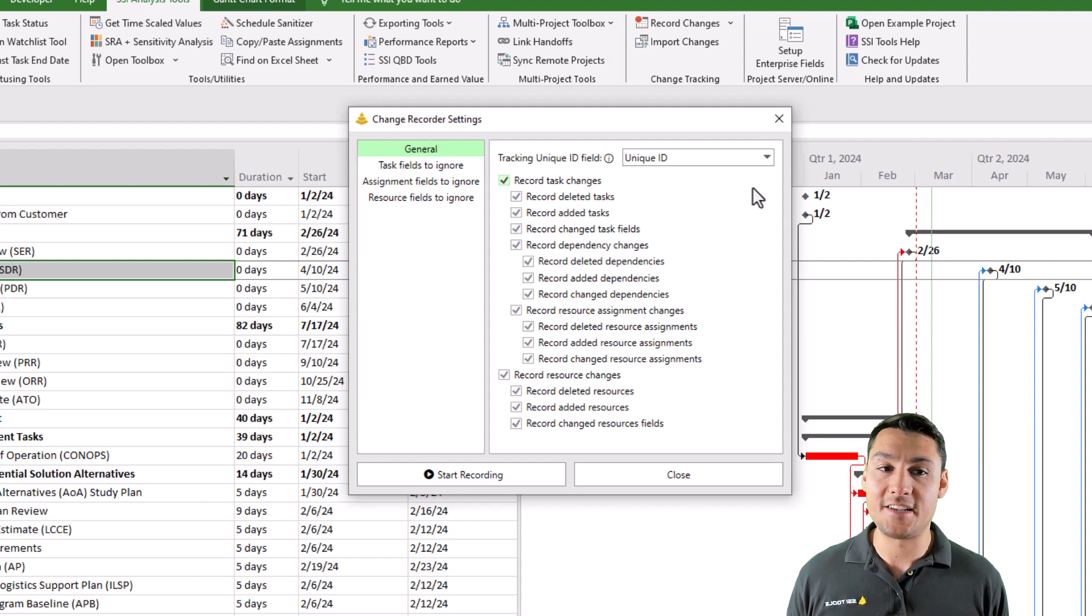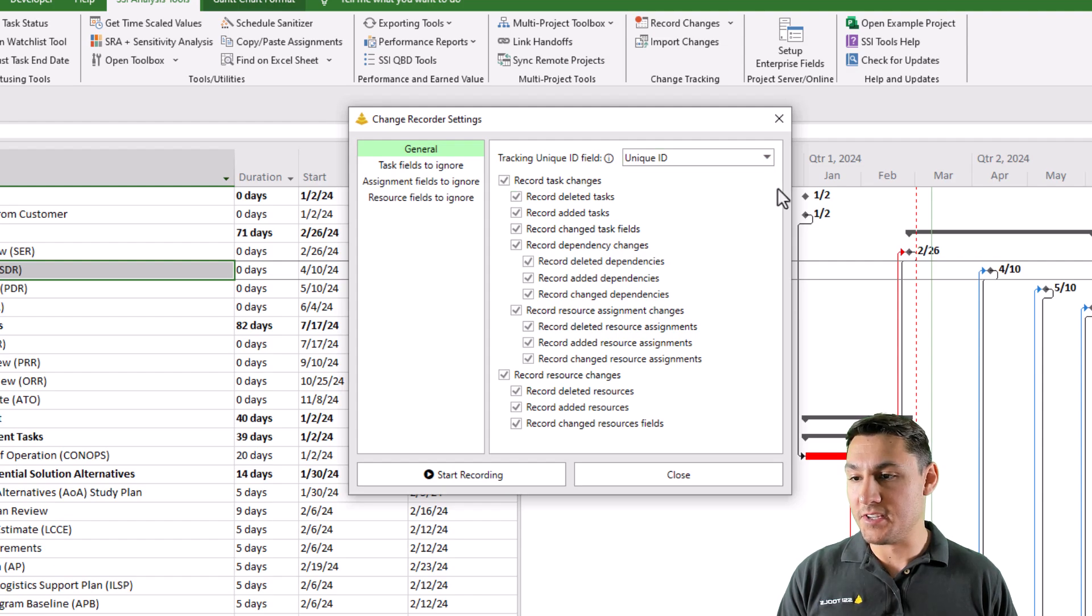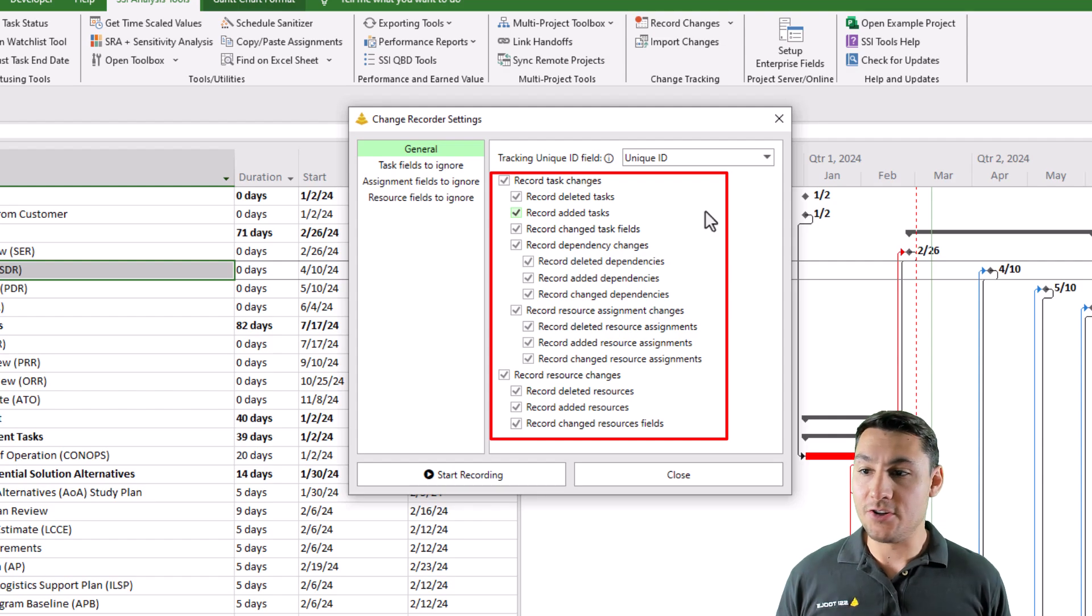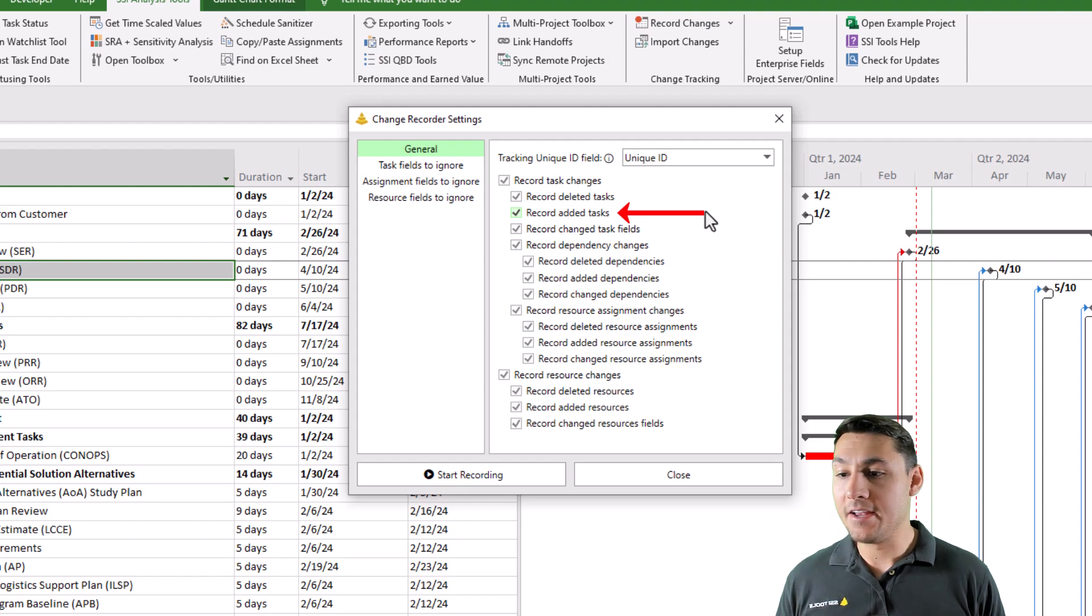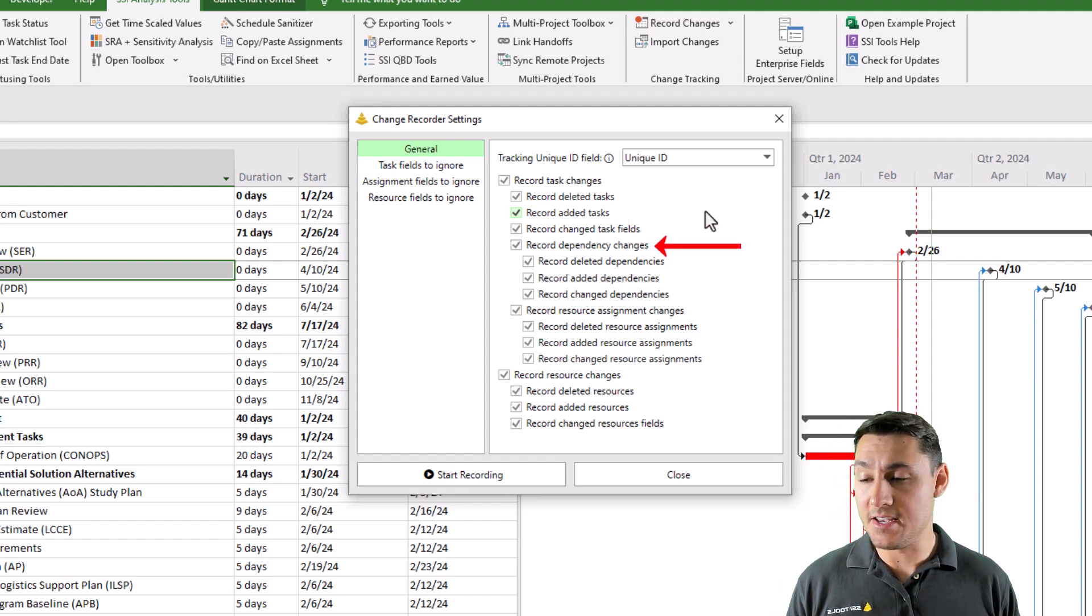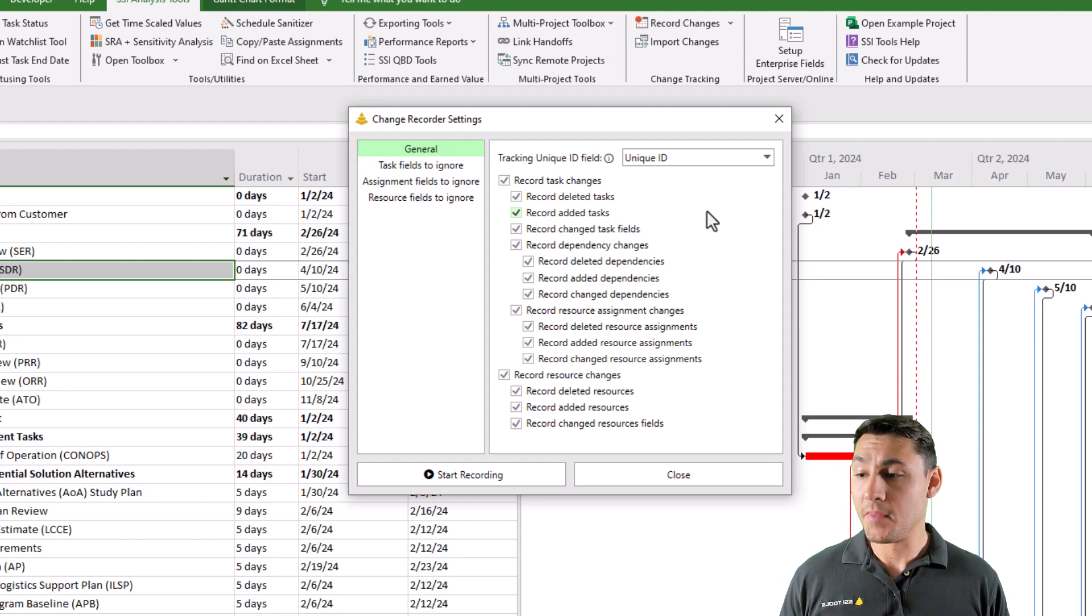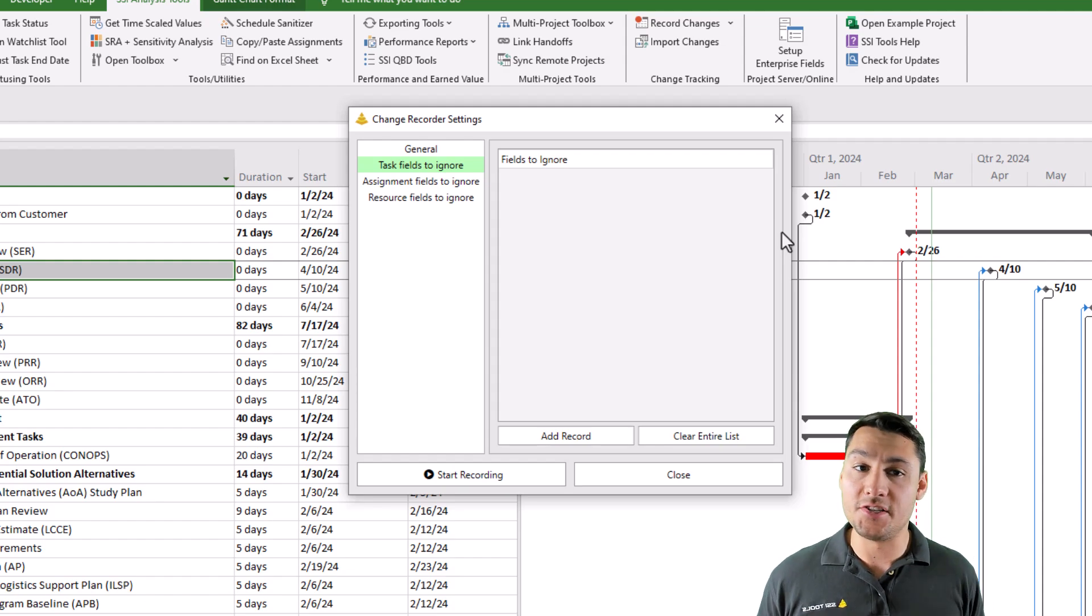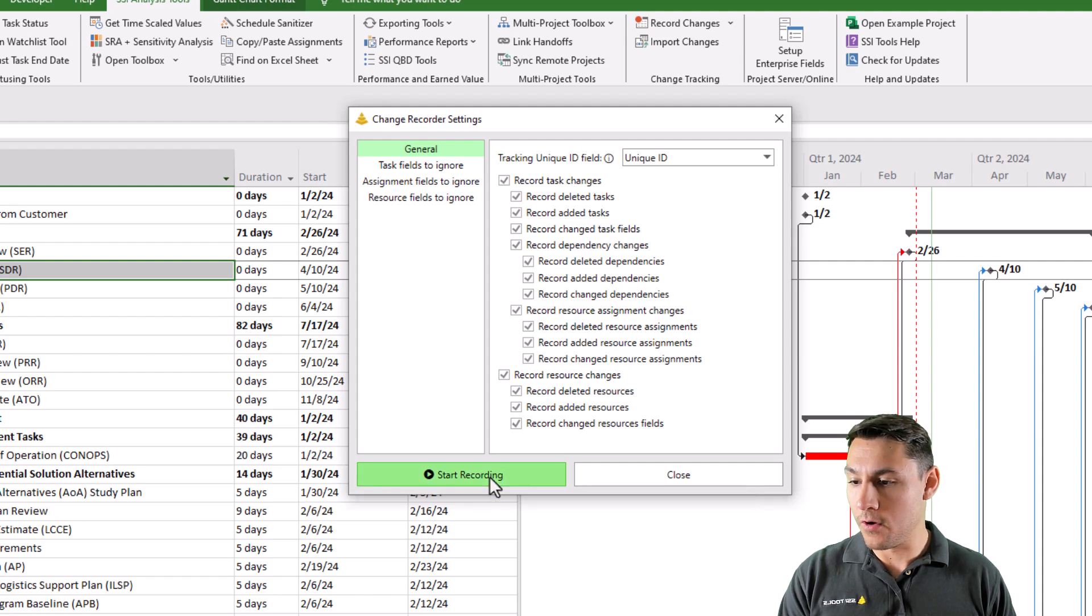It may be some text field that has a formula in it. In the case of my project, I'm going to keep this set to unique ID. Then there's all sorts of options on what you would like the tool to actually record, such as tasks that are deleted, tasks that are added, changes to fields, changes to dependencies. You can choose whatever you would like to record. And if there are any specific fields that you want to ignore changes into. Once I'm happy with all my options, I'll just click the button that says start recording.